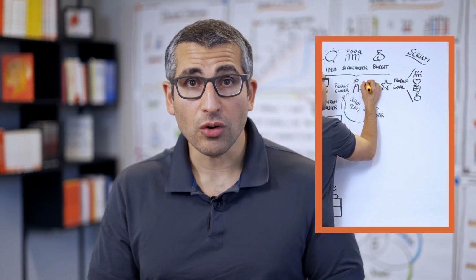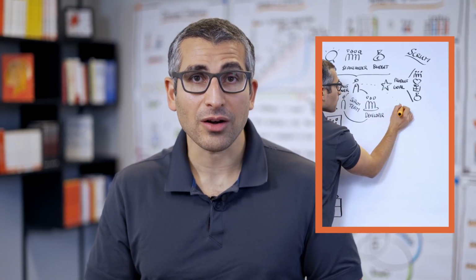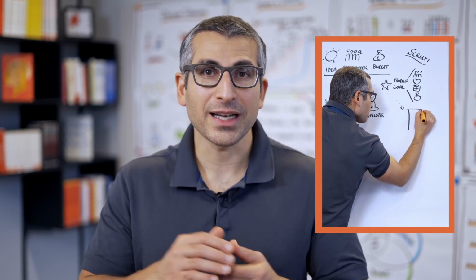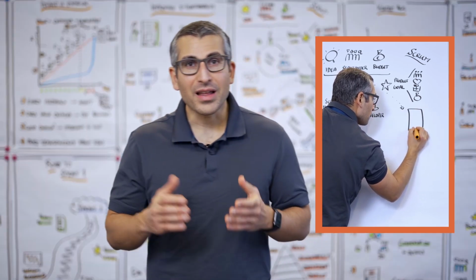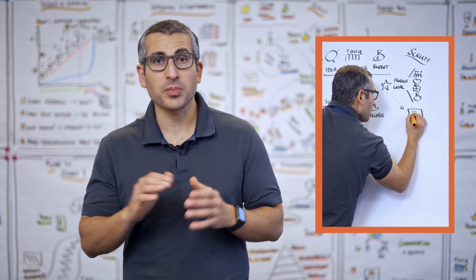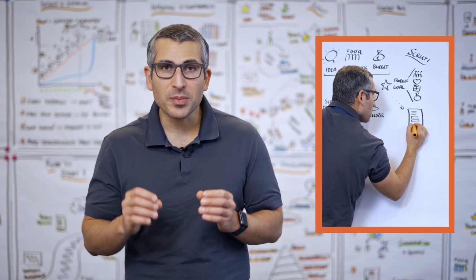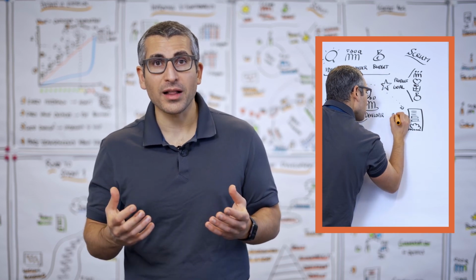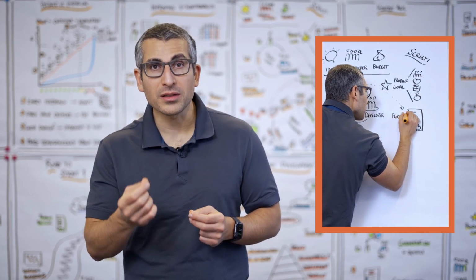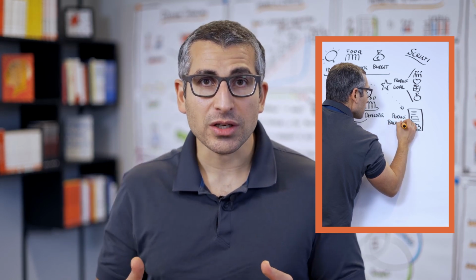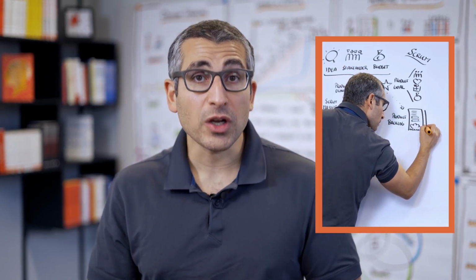From the product goal, you can create the product backlog. That product backlog, again, has 4 key characteristics. The first characteristic is that every product backlog is prioritized. There needs to be a clear order, ideally based on customer value, on how we want to build the product. Based on that prioritization, we detail the different requirements.